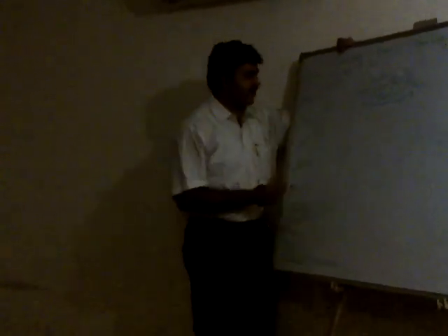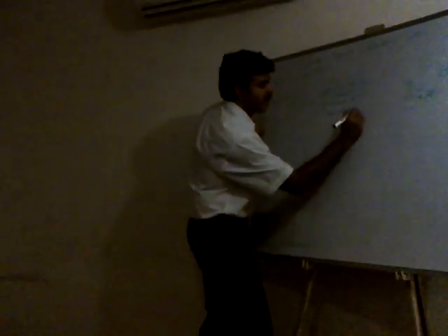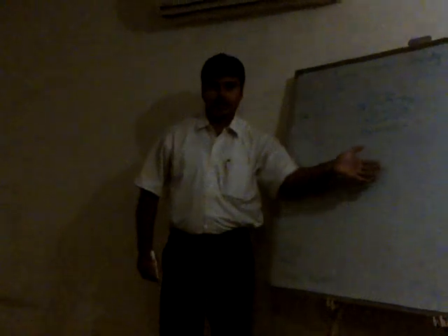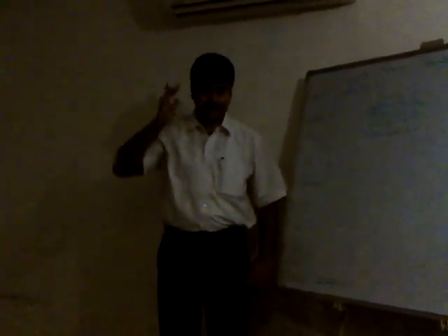Okay. So now what happens after you have come out with the scope baseline? Next we go to project time management. The first process was what? Plan schedule management, wherein you come out with the schedule management plan. Right. Now what were the inputs for plan schedule management? Project management plan, project charter, OPA, EEF. Output, you came out with the schedule management plan.